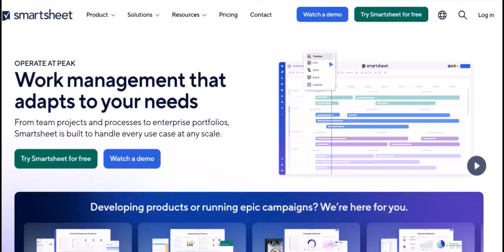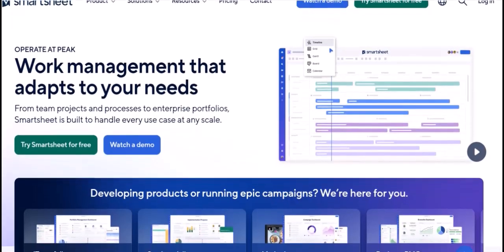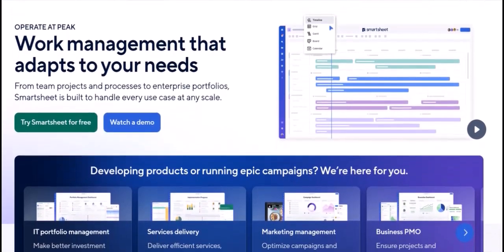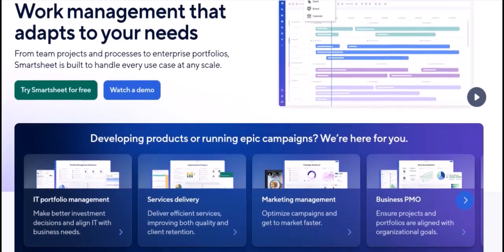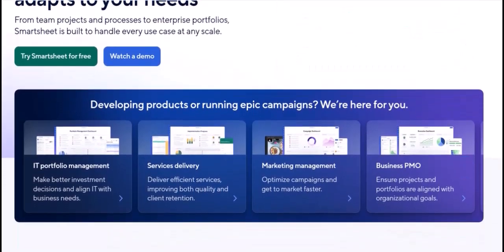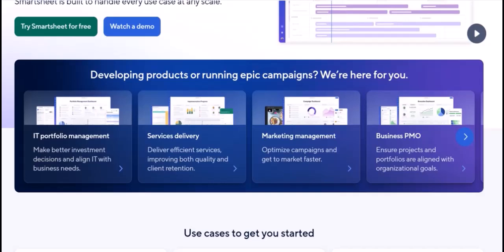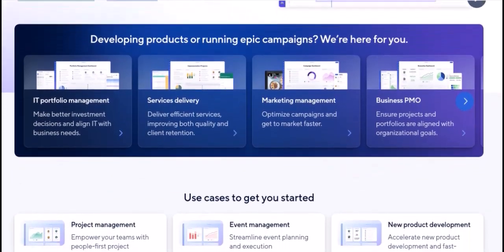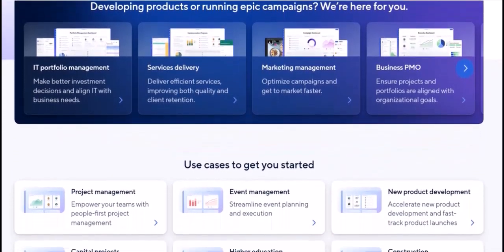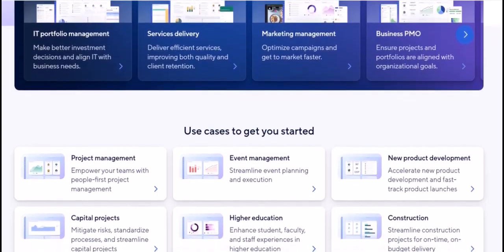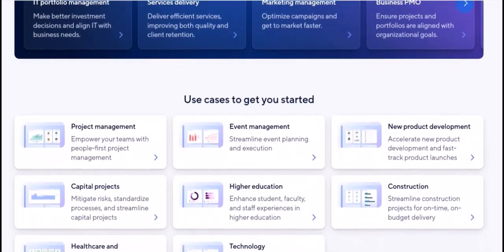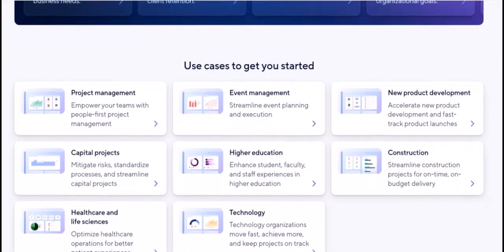For example, if Install Roof is in row 5 and must follow Build Frame in row 4, you'd enter 4 in the predecessors column of the Install Roof row. Watch the chart on the right. A dependency arrow will immediately appear, and the taskbar will shift to follow the predecessor. This is the foundation for creating, tracking, and managing projects visually in Smartsheet.